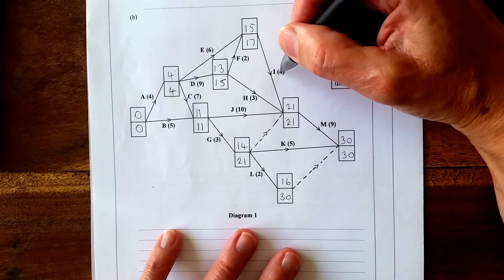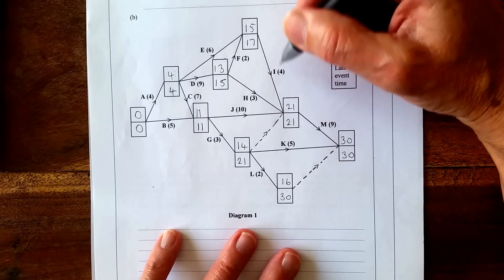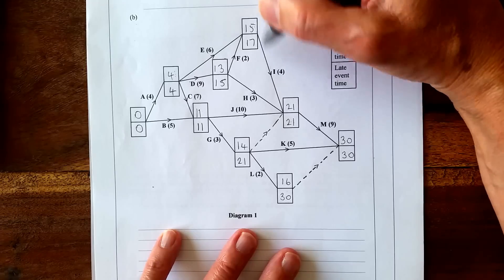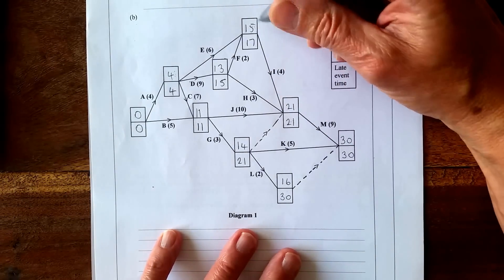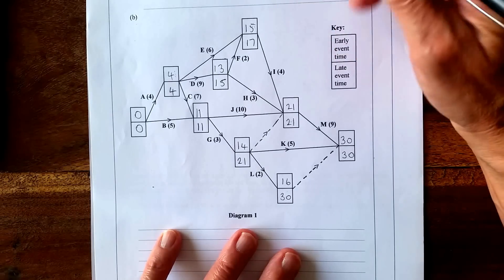So it's late event time, activity time, and early start. So subtract 4, subtract 15, so that's 19 altogether. So the float would be 2, because 21 subtract 19 would give 2. So that's what the total float is.